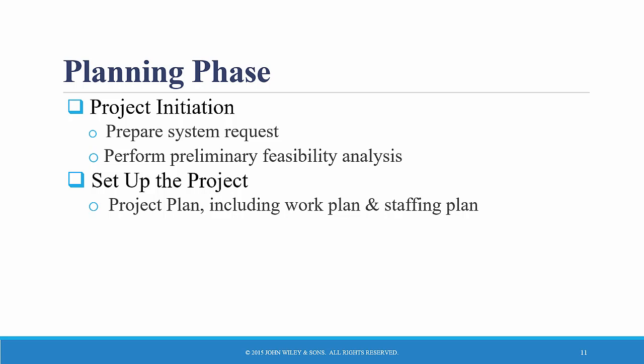There is a feasibility analysis that examines key aspects of the proposed project. Technical feasibility, that is, can we build it? The economic feasibility, will it provide business value? And the organizational feasibility, if we actually build it, will people actually use it?